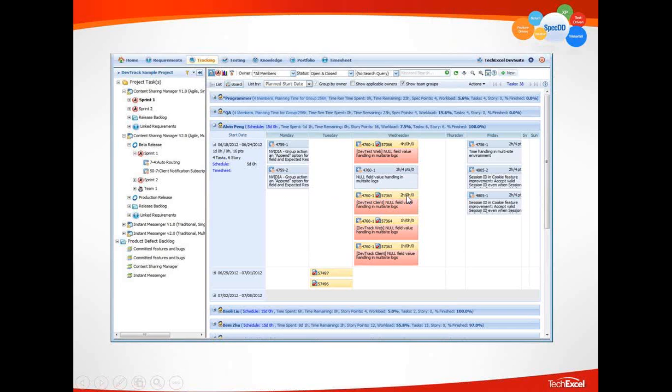Obviously, there is the time spent and time remaining: time spent 4 hours, time remaining 0 hours. The time remaining of each task represents how the team members are driving themselves to finish the task, based on the fact that they estimate, oh, for this development task, it's going to be about 1 day I can finish. But then we want the team member to drive themselves to finish the task within, hopefully, the time estimated as a target to accomplish it. So that's the sprint workload.